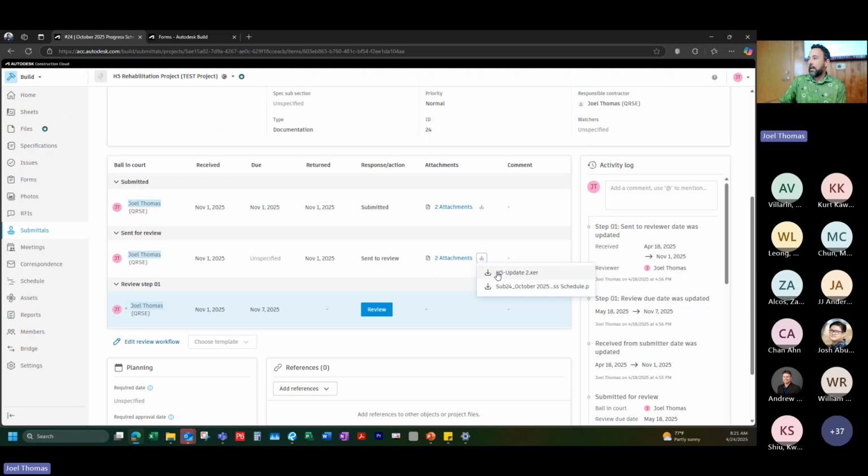It looks like we've got a XER file. That means when you see that, it's a P6 raw file. You could also see MPP for projects. So if you see the .mpp or .xer, that means it's an actual raw schedule file, which is good. That's what we want. And then I also see there's a PDF here. So I would download both of these.